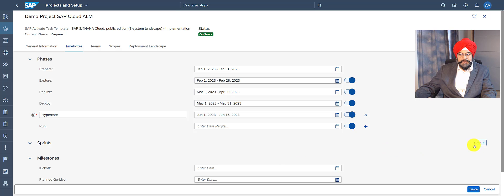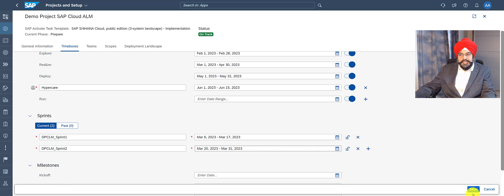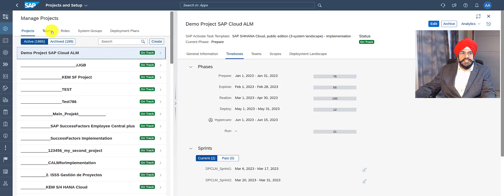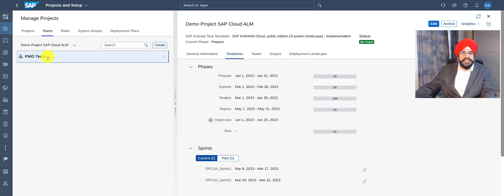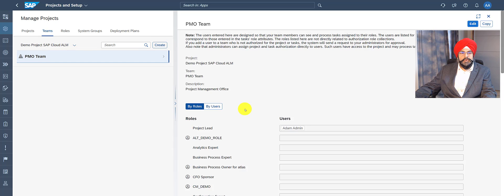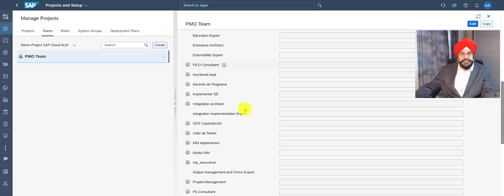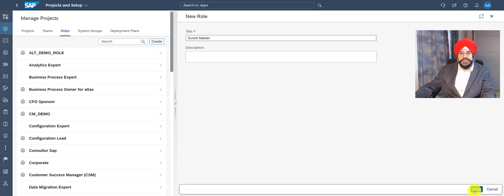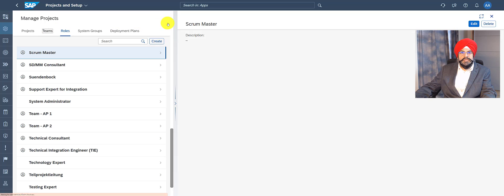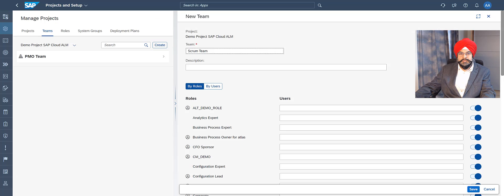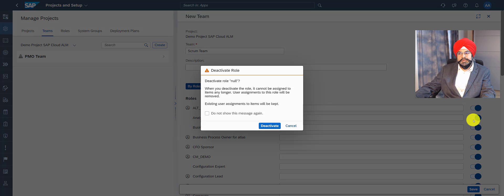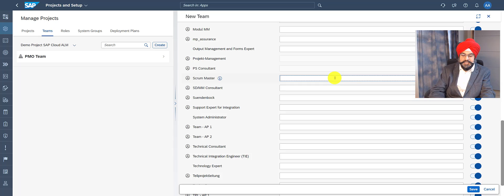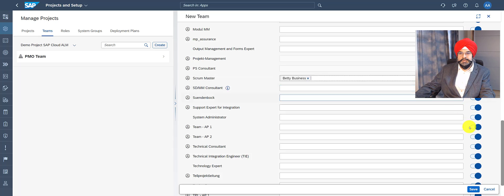My realized phase is from March to April, so I'll go ahead and create a sprint. I've created two sprints and now let me save my work. Now I want to create a new team — for that I need to go to the split column layout and access the Teams tab outside my project. I see my project already has a PMO team. I want to create a new team called the Scrum team and I want to see if the role Scrum Master already exists — in this case it does not, so let me first create a role. Now I'll create a new team with only limited roles including the Scrum Master role. I can deactivate the roles which I do not need. I can see my custom role Scrum Master is there, so I can assign a person to this and save my team.